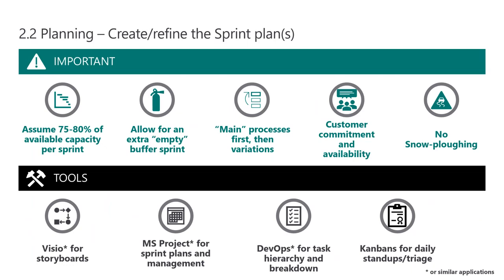I'm repeating myself a little bit, but it's important to say define your main processes first and then the variations. Get them done in the system, show them, and then start working on the variant. Don't try and create the most complex process right from day one as a big bang, right? The level and quality of feedback you're going to get from getting the business to review the main process is very significant. So when you're starting to build or configure the variations, you're going to be much more likely to be successful than if you try and do the whole thing in one go.